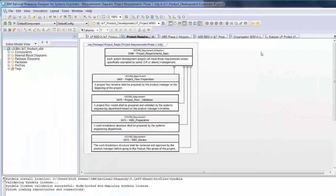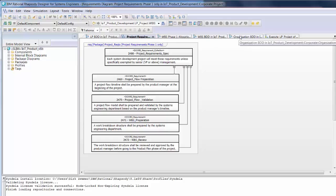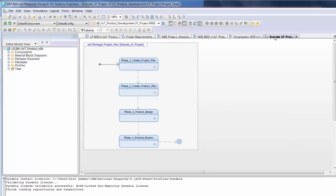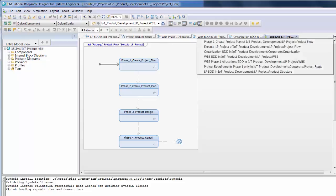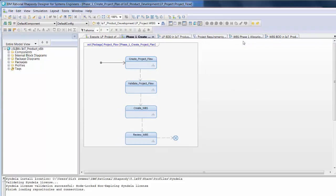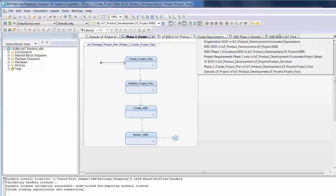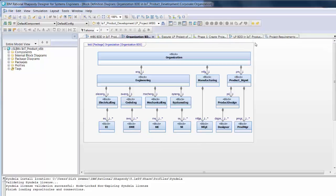After the requirements have been brought into the SysML model, we continue to develop the architecture of first the project, then the product in Rhapsody. On the project side, we can express the process as a hierarchy of activities, with four phases at the top level. Phase one is further decomposed into lower-level activities, and so forth.